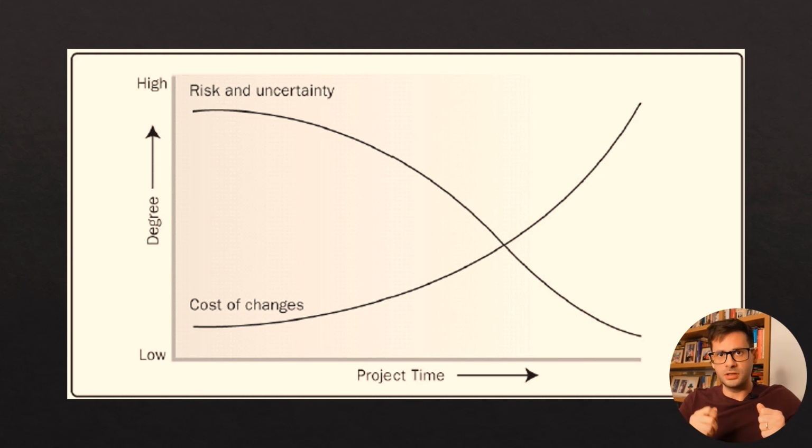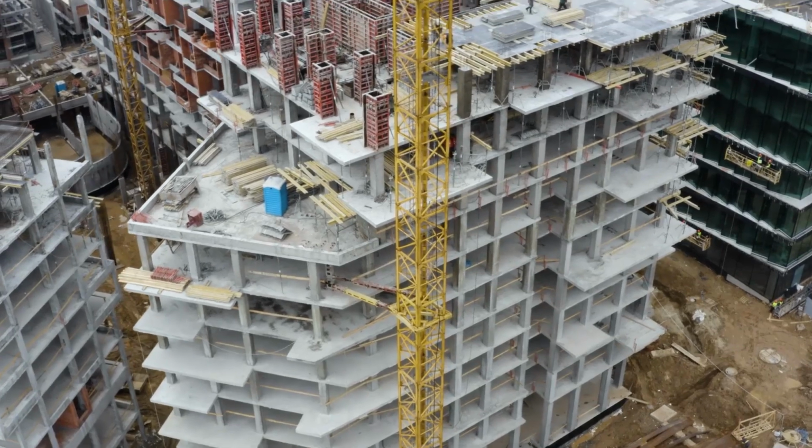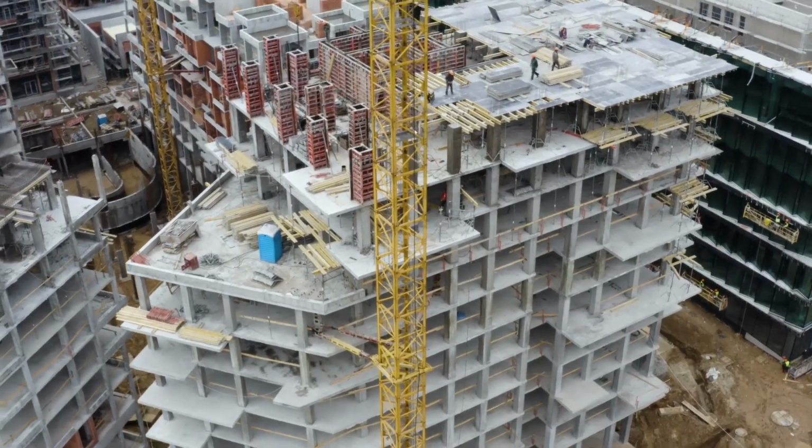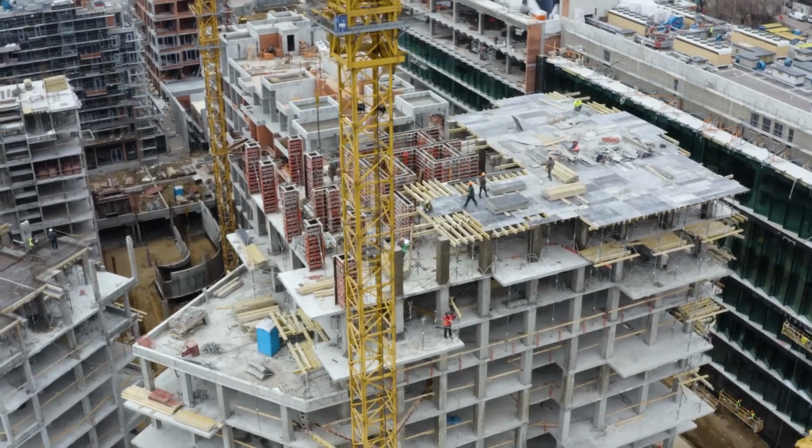It's very difficult to make changes the more a project progresses. Imagine it like this. I'm trying to build a house and it's supposed to have 3 floors. Well, now somebody comes over and tells me, you need to do actually 2 floors or 5 floors. So I either have to take floors out or add others in. This will add more cost if I've actually started building the actual building.